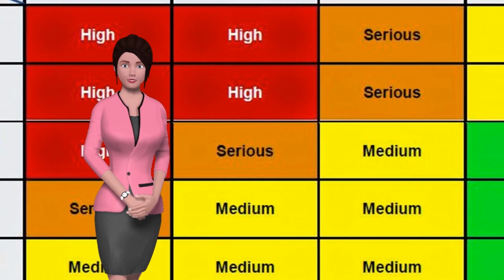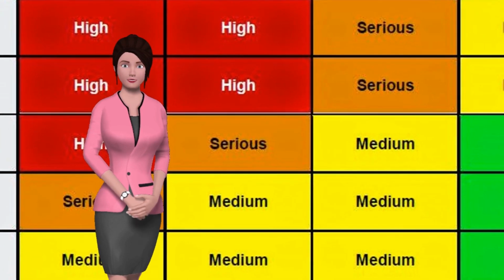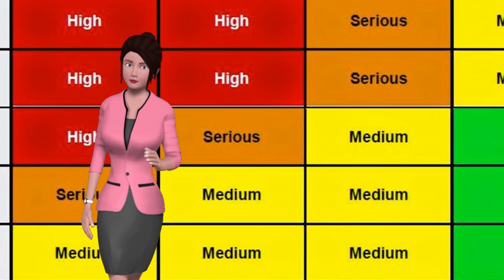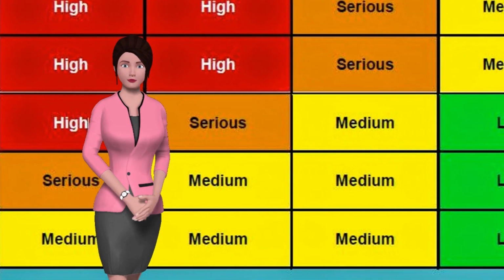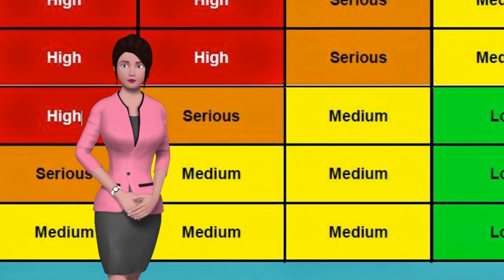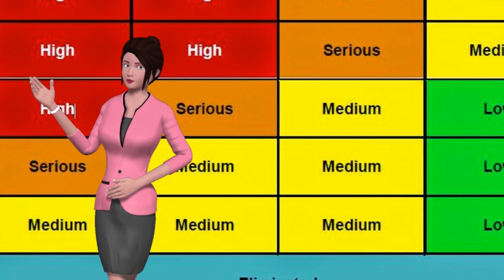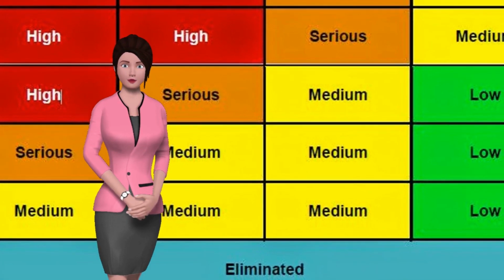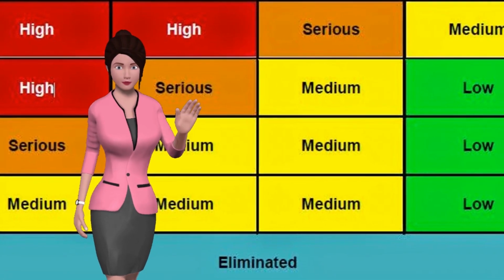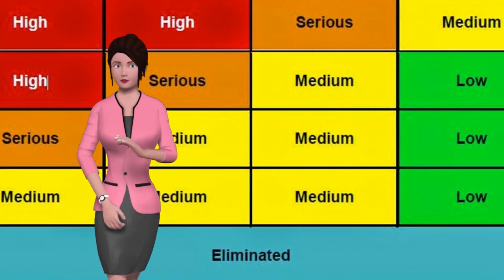One of the aspects of the risk assessment template for IT is that the spreadsheet has a built-in calculator that figures out the likelihood of a risk in fact occurring and then multiplies that against the impact it would have on the project or the organization. This way, a project manager knows the potential harm of the risk and so can prioritize the response to it if or when the risk happens.